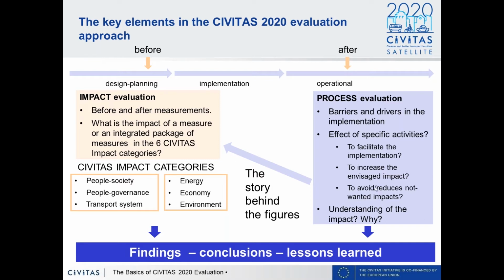If we want to evaluate the impact, then we don't have to measure only in the corridor some figures, but we also have to look to the area around. It was not that long ago, 3 or 4 years ago, I saw a project where people did really evaluate a corridor and neglected the environment around, and all the negative impacts came in the environment around. So this is not a good example of evaluation.